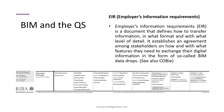Employers Information Requirements: the 2020 version of the RIBA Plan of Work includes an Information Exchange Taskbar at the foot of the plan. The idea being that the information produced at the end of a stage then influences the decisions and work required during the next stage. A typical Employers Information Requirements in BIM will be divided into three areas, covering technical, management and commercial aspects.